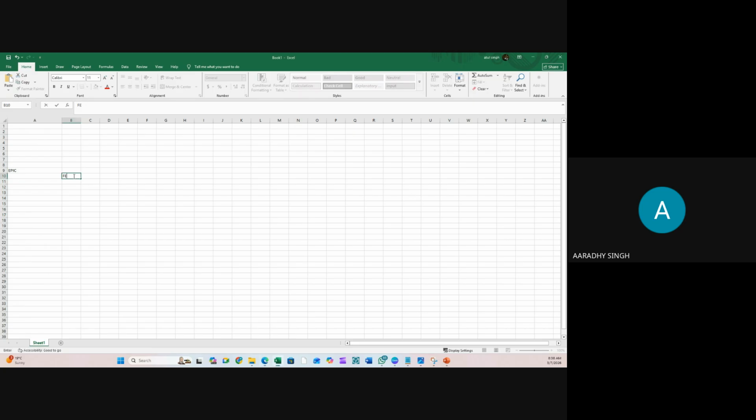You see here I can create a feature. Under an epic, we can create multiple features, for example feature 1, feature 2, and feature 3. Correct? Under a feature, you can create a user story. A user story is also called a product backlog item.